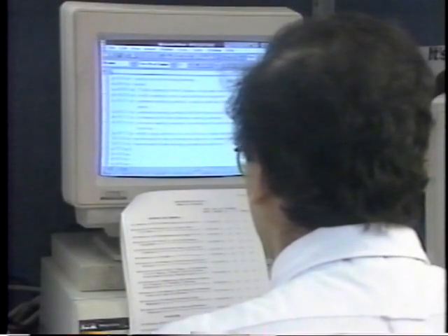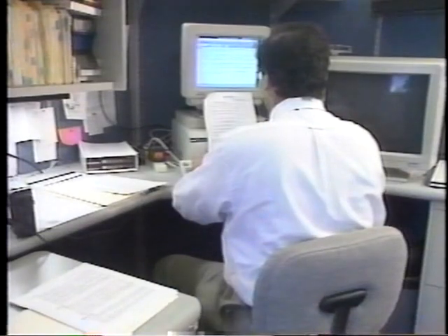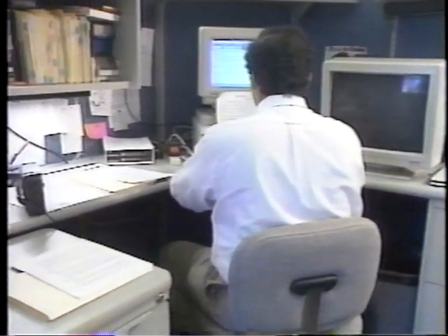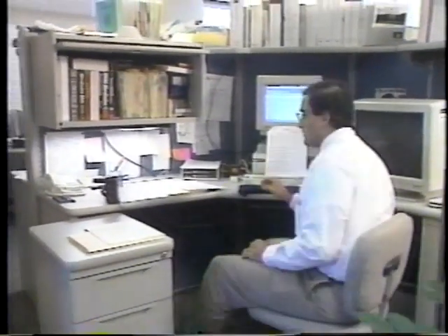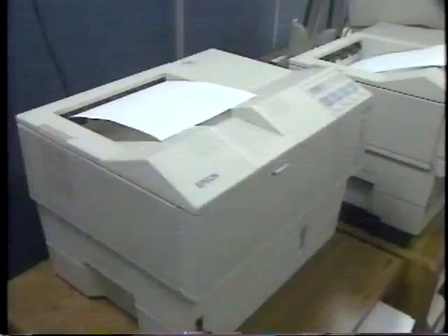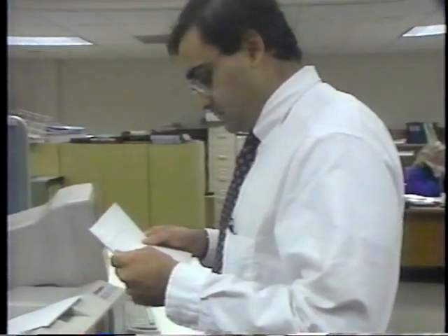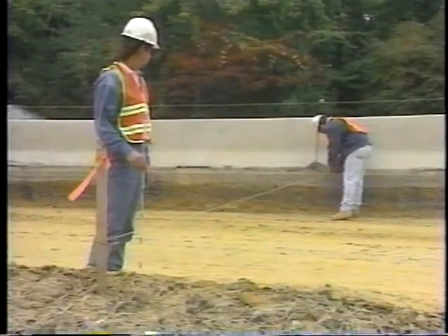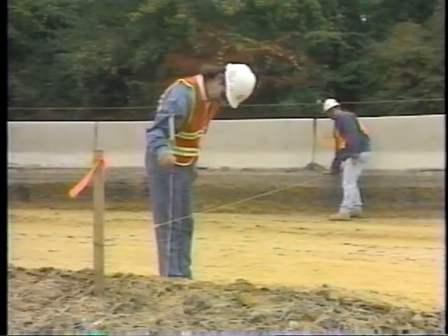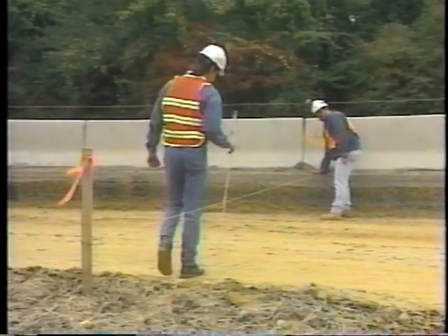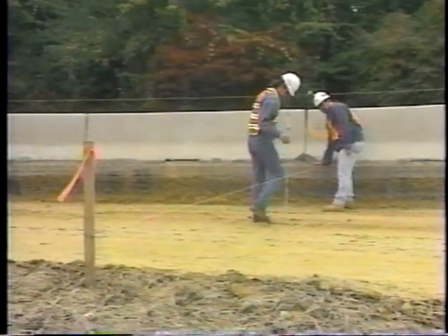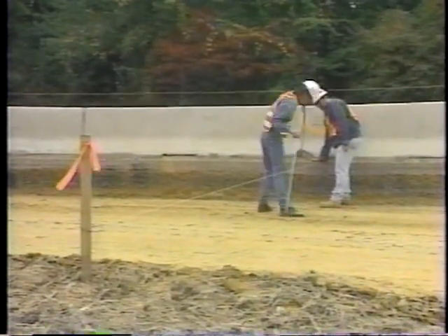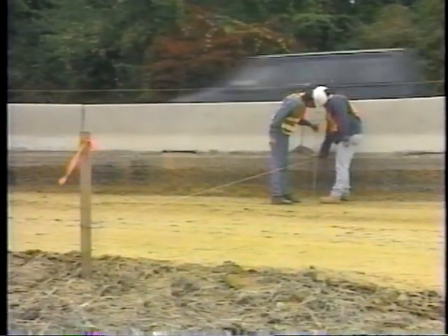Activity groups should be used when only major contract characteristics are known. Their primary use will be with small contracts, those which require very little time in the pre-construction stages. The groups consist of the 4 functions of construction management. They are staking, inspection, office engineering, and project management.